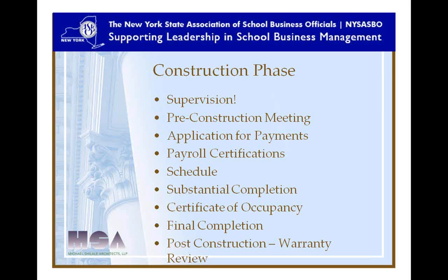Should that contractor walk off the job, we want to make sure that our clients have enough money to replace that door or fix those windows or get that lighting or air conditioning or heating system to work properly. So we attach dollar values to all that. And for some clients, we double that and withhold twice the punch list value, and that has to be put in the contract up front. But sometimes that helps getting the punch list items complete in a more timely fashion.